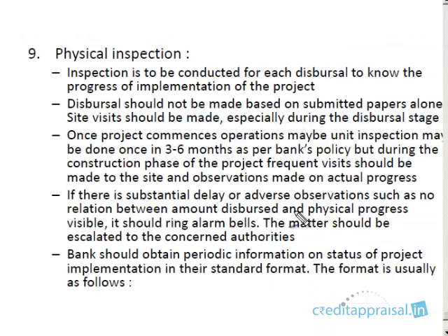Okay, these are not just papers submitted by the company. You have to physically inspect the project. Right, you have to go to the site. You or your inspection team has to be on the field, gauging the actual progress of the project. Disbursement should never be made on the submitted papers alone. Right, a site visit should be mandated during the disbursement stage.